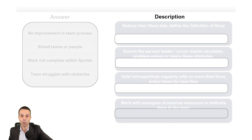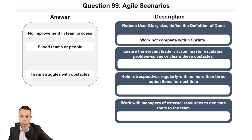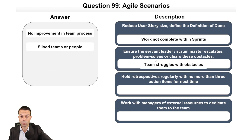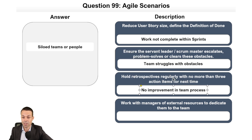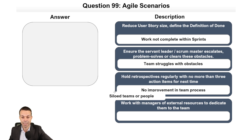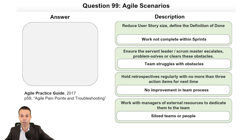More agile scenarios: if work is not completed within sprints, reduce the story size and ensure the definition of done is crisp. If the team is struggling with obstacles, ensure the servant leader or scrum master escalates and clears those blockers. For no improvement in team process, hold retrospectives regularly with no more than three action items. For siloed teams, work with managers of external resources to dedicate them to the team using the whole team approach. That's page 59 of the Agile Practice Guide.